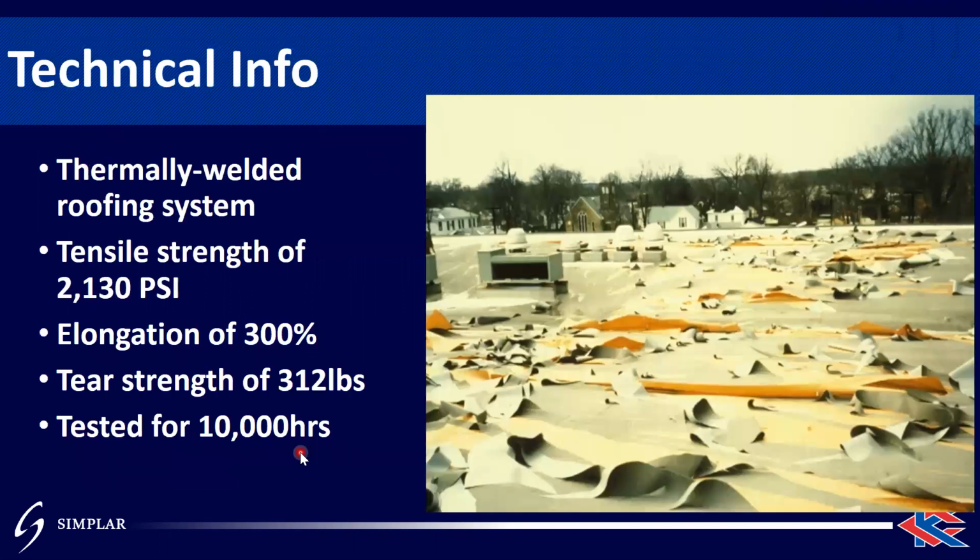And by the way, this is the roofing system that was spec'd down below. It was one of the more popular roofing systems back in the 90s, and upon thermal cycling a few years in, it literally exploded off of the roofs. So even though it has impressive looking technical specification details, it doesn't ultimately speak to the value received by the client in terms of the outcome.